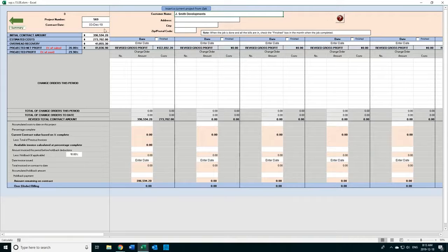Now, that's the date of the contract when you signed the contract, the amount of the contract, the initial contract, your estimated cost, your overhead recovery based on, again, when you go to the estimating, you're going to predetermine what your overhead costs are, what percentage of your overhead, and that will import the number into the work in progress.